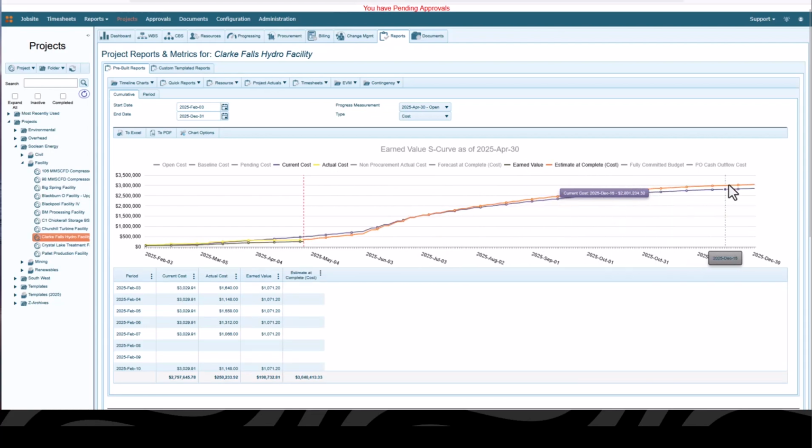So those would be my classic S-curve, but in 4castplus we provide a number of other timeline curves that you can play around with, to exactly the requirements that you have. Right now I have it zoomed out all the way to the full year, from the beginning of 2025 to December 2025. Now, this vertical bar here is the current progress measurement, in terms of the cutoff date that I'm using to view this chart.